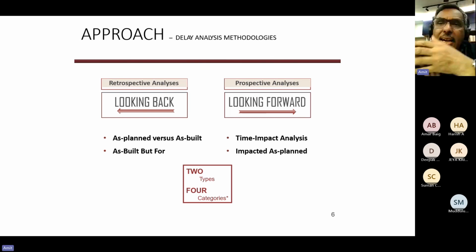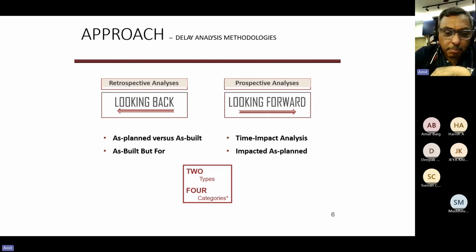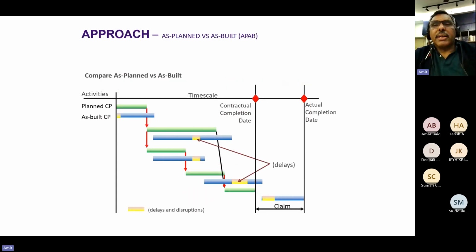Now, prospective delay analysis may not be accurate. It may go a little bit beyond, and therefore the employer may also be conservative in giving you EOT on that. In India, generally, we give EOT after the event is over. That has its drawbacks. If the event is taking 3 months, then you are giving an EOT after 3 months. What happens in the 3 months? So that becomes a problem. Right. So first take retrospective.